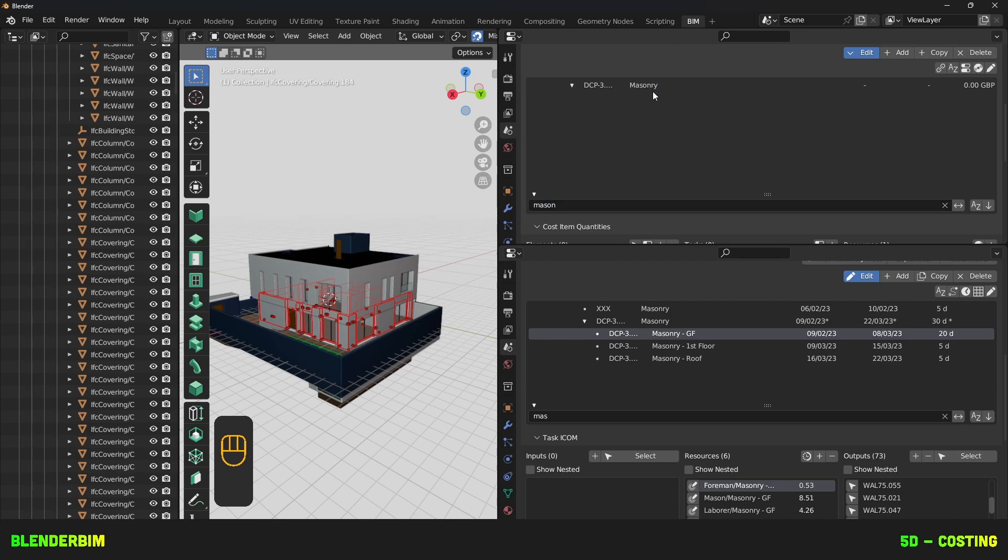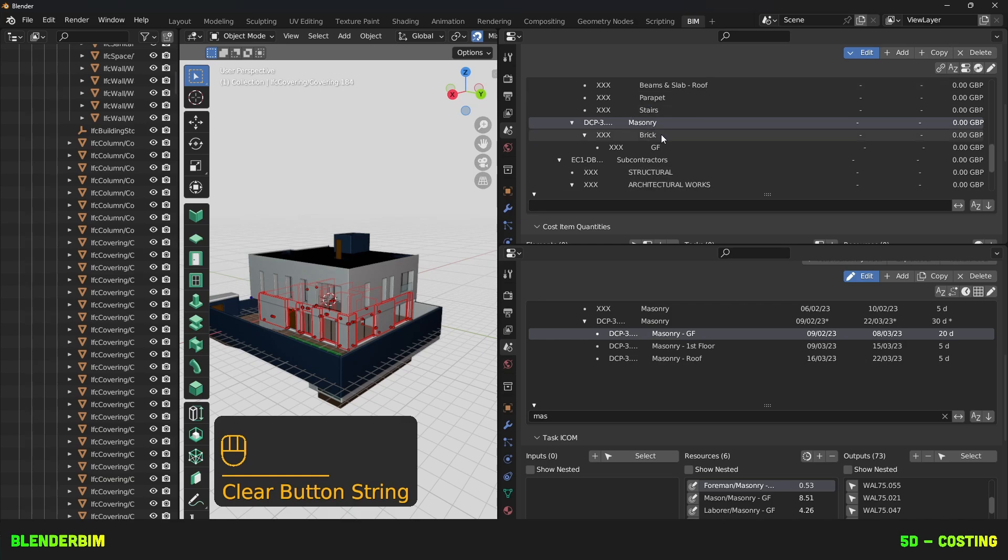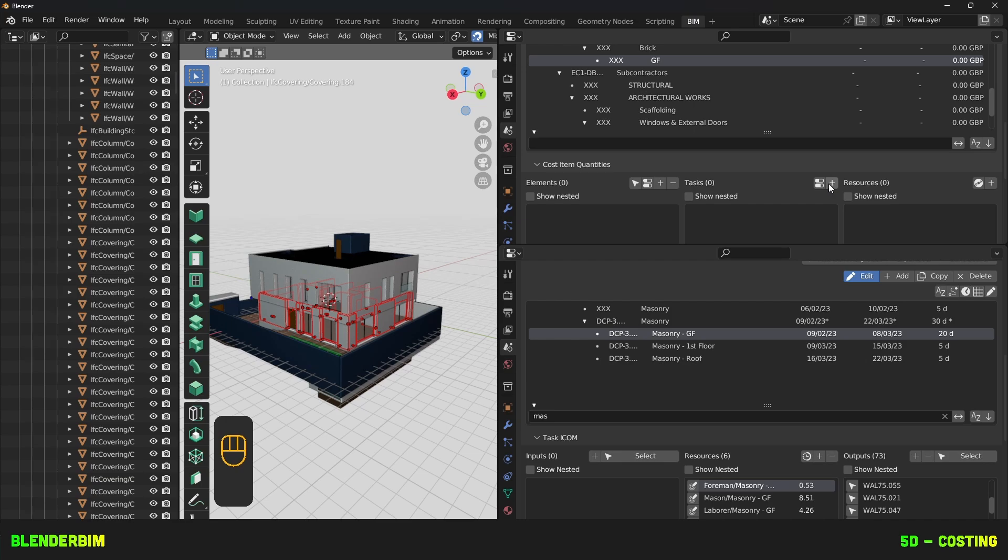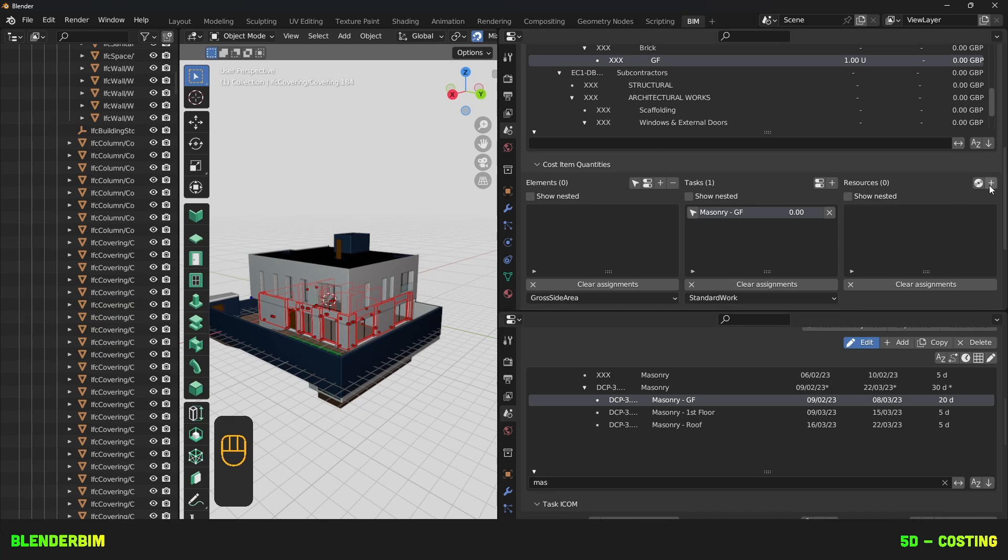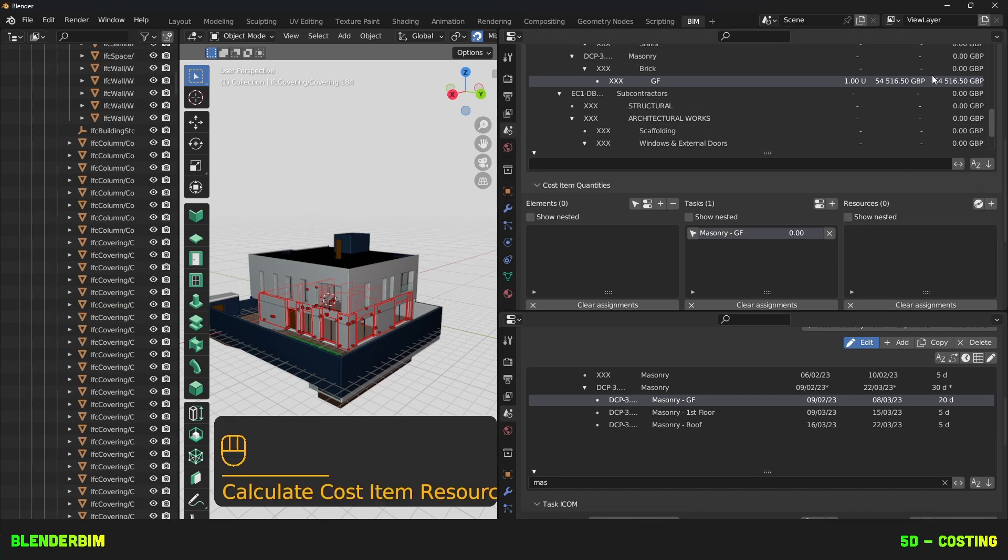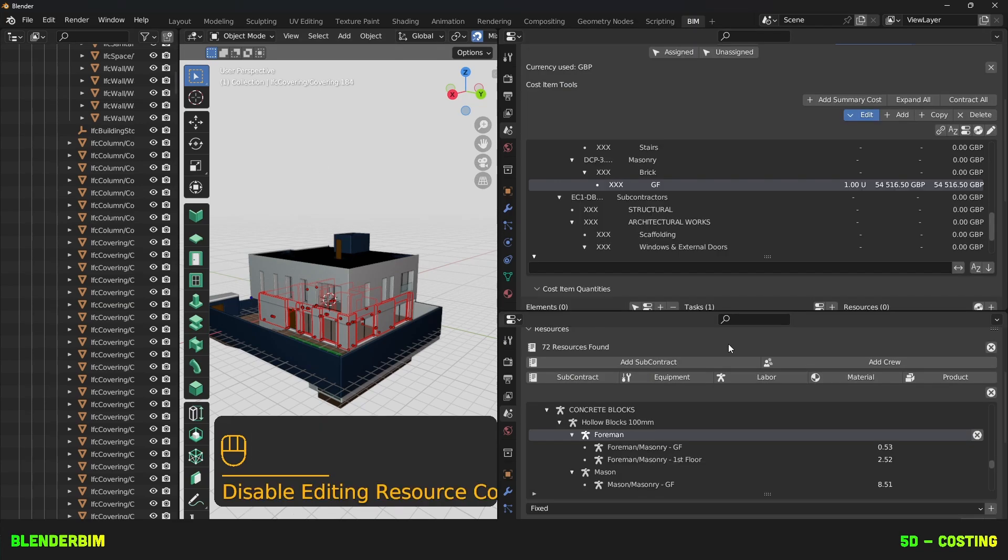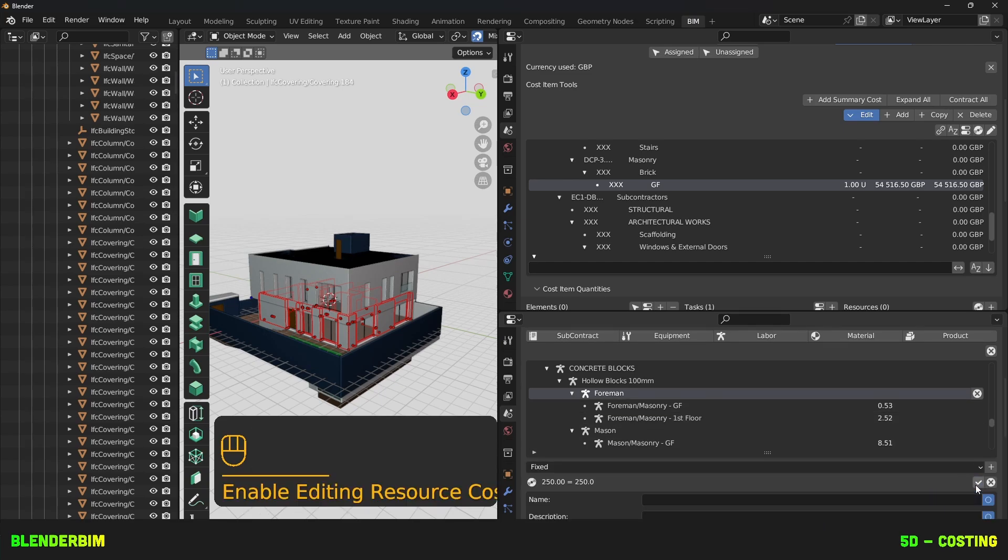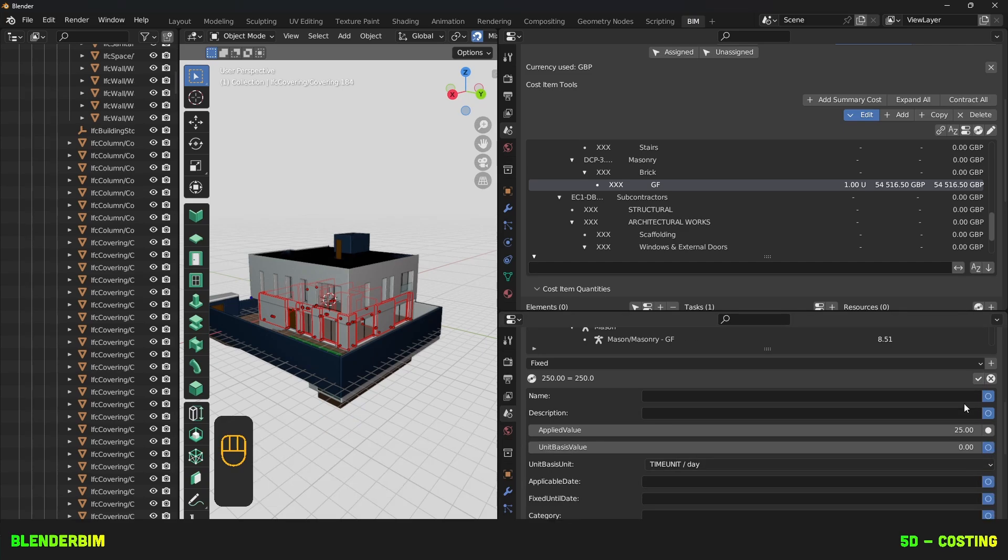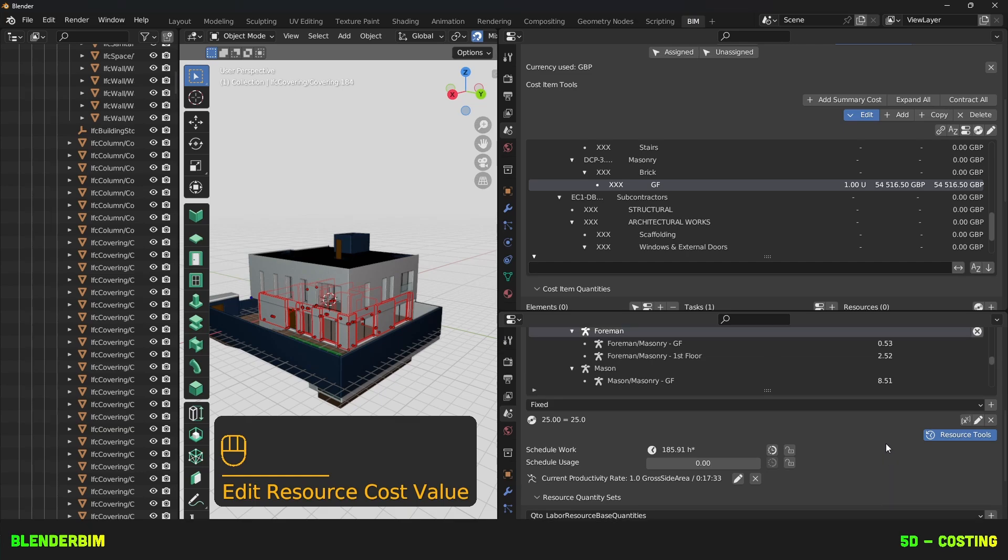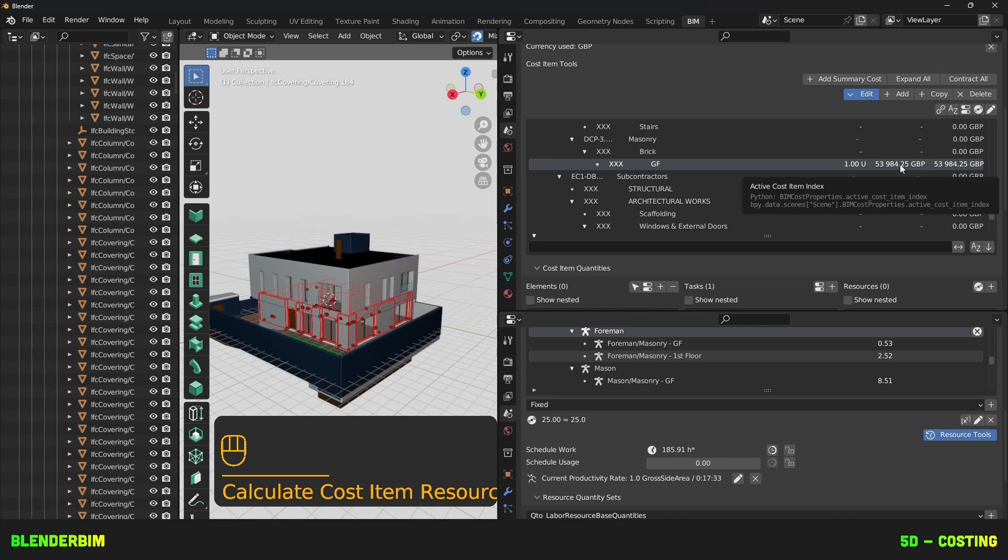Let's look for it. We can see it's all of these resources. Now what we can simply do is select our task. Then we'll choose an activity here called masonry. There we go. Masonry. Brick ground floor. And I'm going to assign just my task. And I'll press on plus. So now I have my task assigned. And because they have these resources with base costs and whatnot. Now I can just press on this calculate cost item button. And I should have my total cost. So it takes into account my units. So if I change just this resource cost back to 25 pounds an hour. So I'll remove my units. And now I'll press on calculate again. I should have a different price.